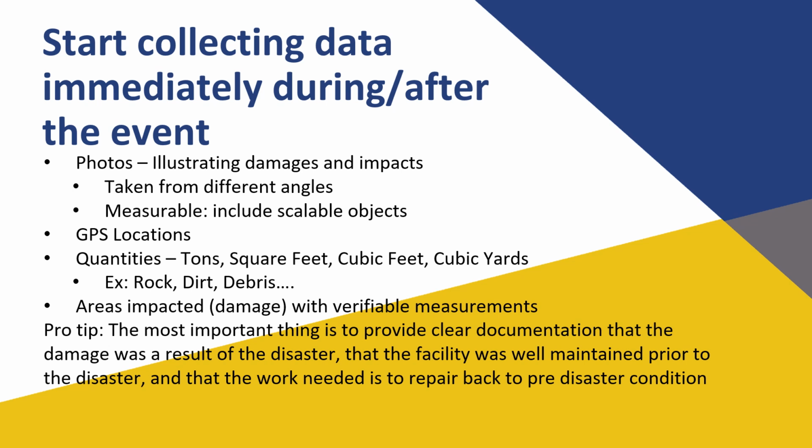A tip: the most important thing is to provide clear documentation that the damage was a result of the disaster, that the facility was well maintained prior to the disaster, and that the work is needed to repair back to pre-disaster condition. Part of this is proving that the damage isn't the result of deferred maintenance, so be sure to collect maintenance documentation and images of the facility before the disaster, and after the repairs.